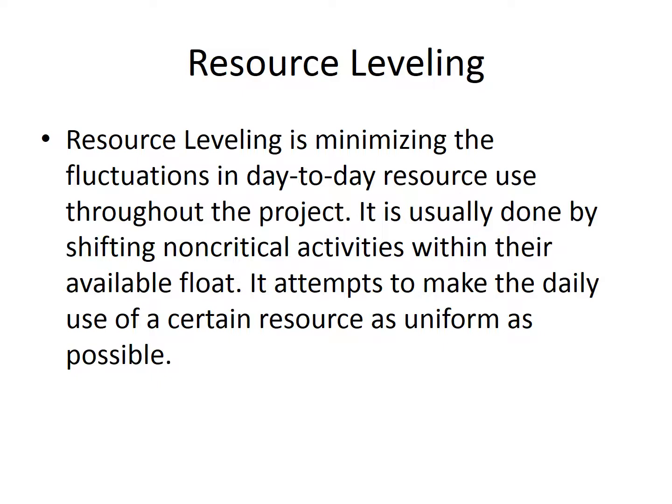We talked about resource leveling. This is more relevant to people who manage multiple projects. So resource leveling is minimizing the fluctuations in day-to-day resource use throughout the project. It's usually done by shifting non-critical activities within their available float, and it attempts to make the daily use of certain resources as uniform as possible.